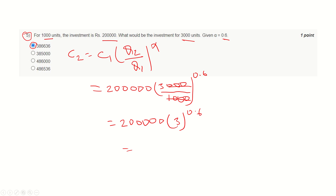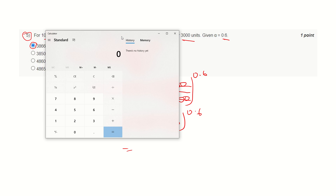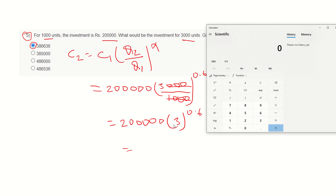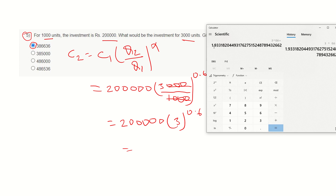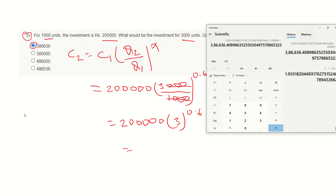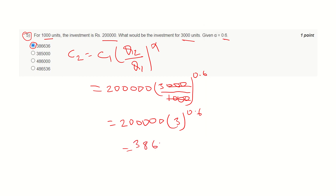For solving this expression, I am going to use the calculator. I have opened the calculator in scientific mode. The base is 3, so I have written 3, and using x raised to the power y, the value needs to be 0.6. This is coming 1.93 something. This has to be multiplied by 2 lakhs. This value is coming 386,636.4 — which is roughly equal to the given option. And hence this is the correct answer.